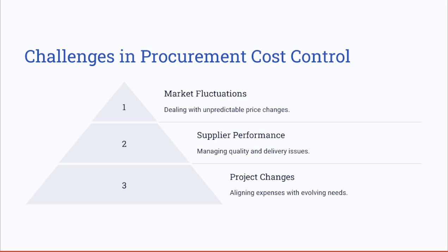What are the common challenges that you might face as a project manager when controlling the cost in procurement? These challenges in procurement cost control include market price fluctuations and supplier performance issues. Also, you might face challenges when trying to align the procurement expenses with the changing project needs.